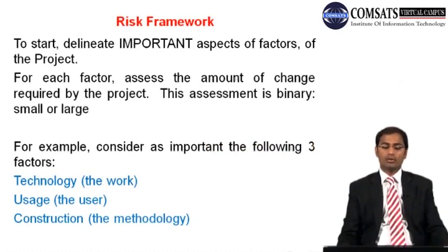So let's talk about a risk framework. To start, delineate important aspects of factors of the project. For each factor, assess the amount of change required by the project. This assessment is binary, small or large. So for example, consider as important the following three factors of one project.